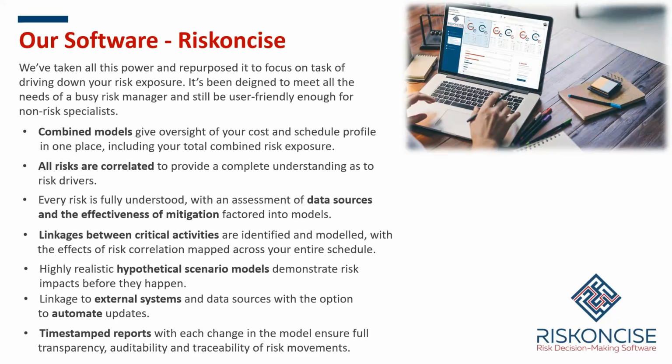You're taking an assessment of your data sources, and you're looking at the effectiveness of mitigation. So not only are you including your causes in the analysis, you're also assessing your mitigation strategies. How likely is this mitigation to succeed? How much of an effect would it have in lowering your exposure? And subsequently, what level of effort should we be applying to achieving that? When we're talking about schedule, we're looking at linkages between critical activities, which are identified and modelled. So this is, again, the effects of correlation being accurately mapped across your entire schedule.